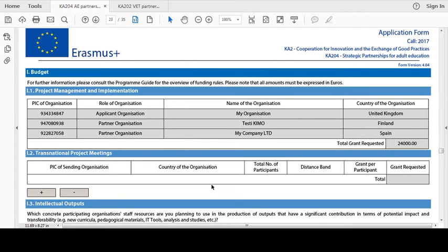Unit costs are a set amount per participant, which is a contribution towards the cost. For some unit costs, you will spend more, and for some perhaps less than the unit cost. Unit costs are used to help make the funding simpler to understand and to manage. For actual or real costs, as the name suggests, you will receive funding for a proportion of the actual costs incurred. Real costs are always used for budget headings, exceptional costs and special needs support.